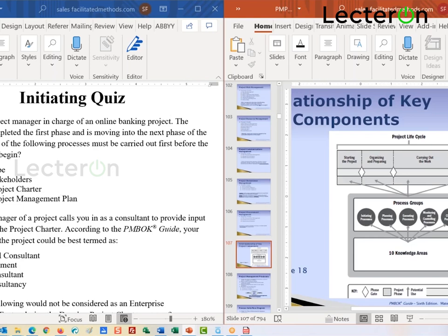Once you move into a new phase, you identify the stakeholders that may need to be added to this phase. I'm not sure we ever take stakeholders off, but we may just engage with them differently, because maybe phase one was R&D and we had certain R&D stakeholders very involved. We don't take them off, but I probably don't spend as much time with them when I get into the actual production environment.